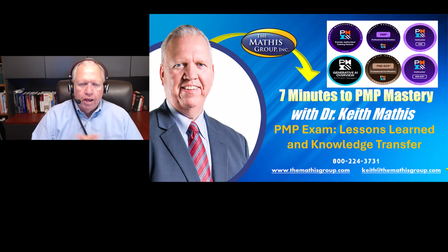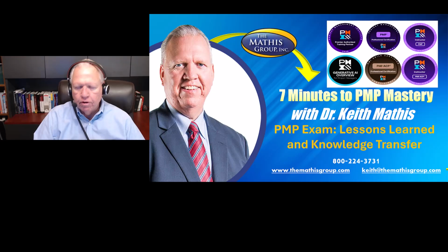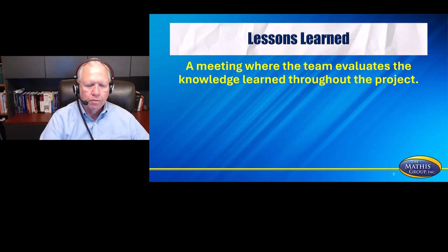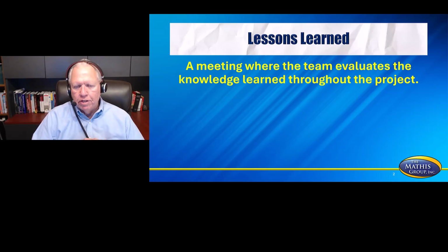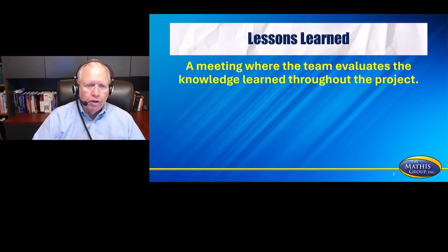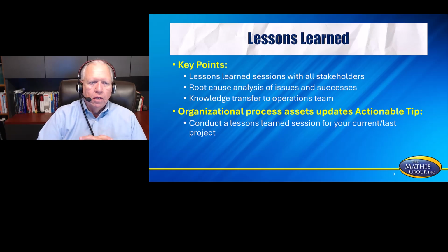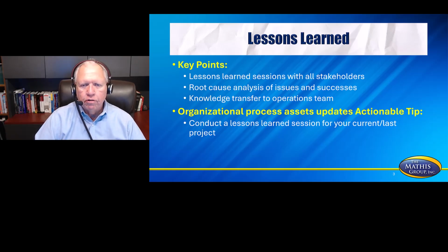Today's PMP exam tip is going to focus on lessons learned and knowledge transfer. When we think about lessons learned, it's a meeting where the team evaluates the knowledge learned throughout the project. And that's not by accident when we say throughout the project. Sometimes people will mistakenly think that lessons learned is only conducted at the end of the project, and they collect all the ideas there. A lessons learned can run from the very beginning of the project all the way to the end.